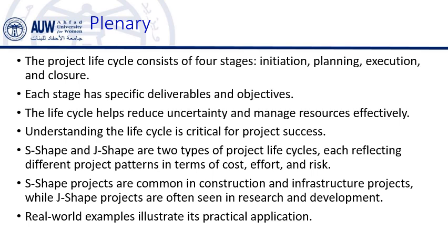The types of project life cycle, S-shape and J-shape, are explored. We explore the S-shape and J-shape project life cycle, highlighting how cost, resources, and effort evolve over time. The S-shape is characterized by a slow start, followed by a steady increase in cost and effort during the execution phase, and then a decrease as the project wraps up. It's commonly used in construction and infrastructure projects.